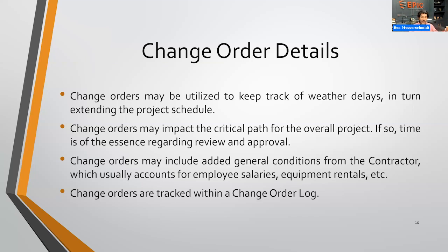Practically speaking, in the summertime you're usually only going to have half days because you can have the 2 o'clock rains or potentially a storm. In the winter, you're going to have high winds. So if you're doing anything vertical, that's going to be impacted because there are strict guidelines as to the maximum wind speed that can be tolerated to work safely in that environment.